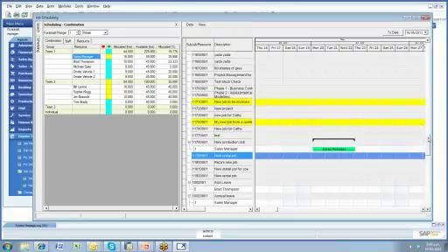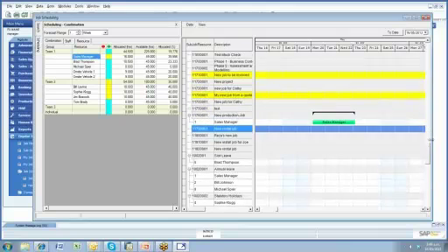And you'll notice I just wanted to point out we do have some jobs here. If you want to track 100% of everyone's time, you could have internal jobs. So for example, 1002 is an internal type job. So sick leave is a certain sub-job, annual leave is another sub-job off that, statutory holidays, so that people can code their time during the week to those jobs. So you can then track that they are working their full 40, 45 hours a week because you know that all their time is in.